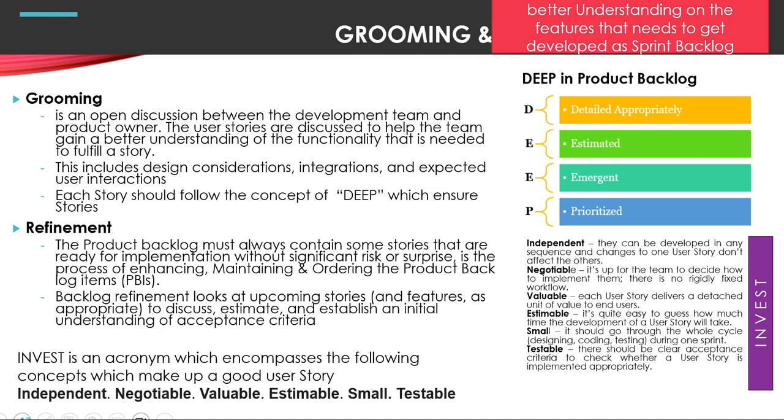Grooming is done on product backlog items, which means it should be done at the story level. So it should have the characteristics of DEEP. That means it should have a detailed approach. It should be estimated, it should be emergent, and it can be prioritized. If you have a user story that cannot be prioritized, it's of no use. If you have a user story that cannot be emergent, it's of no use. Similarly, it's very important to have an estimate.